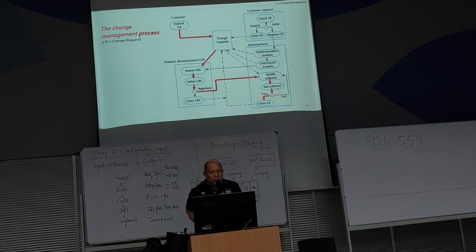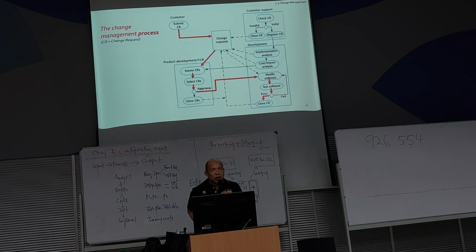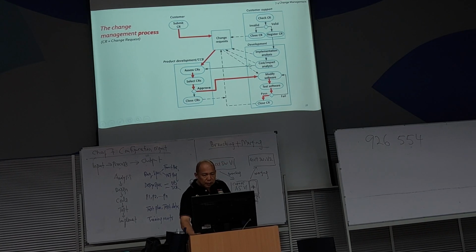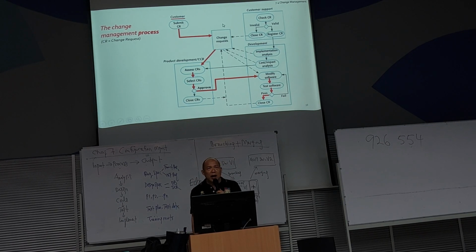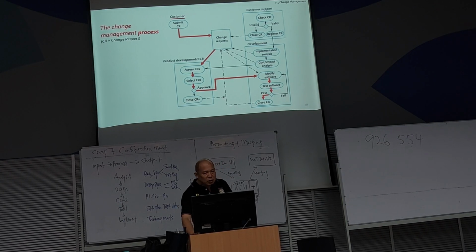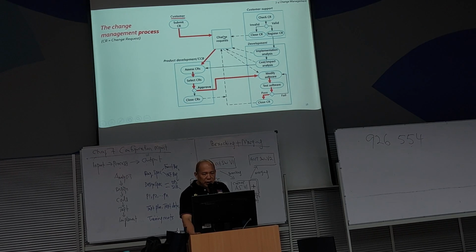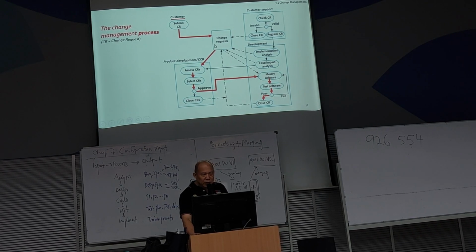So the change management process: when there's a request for change, the change needs to be managed. A request for change can come from the customer. The customer submits a change request, the change request is stored, and later retrieved. When retrieved, the change request is accessed and analyzed.